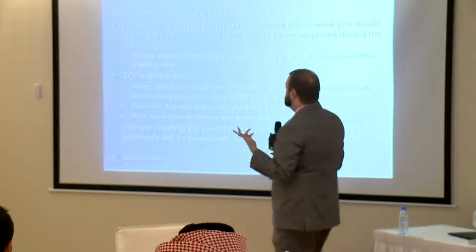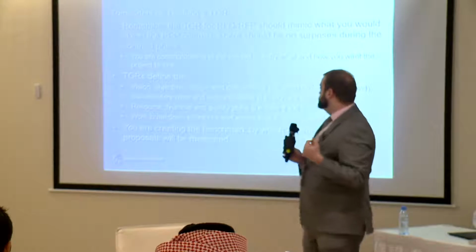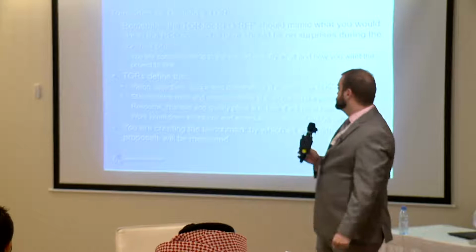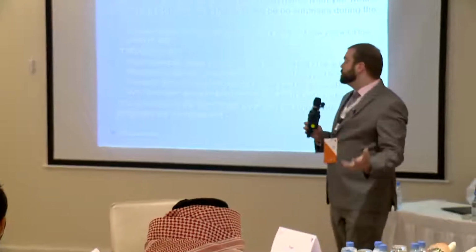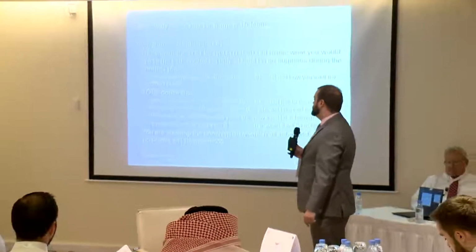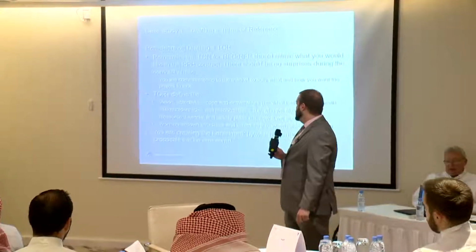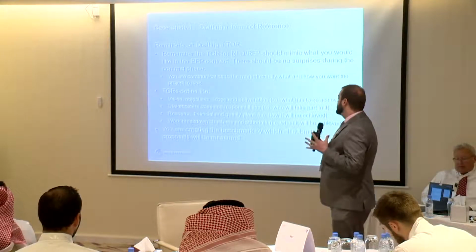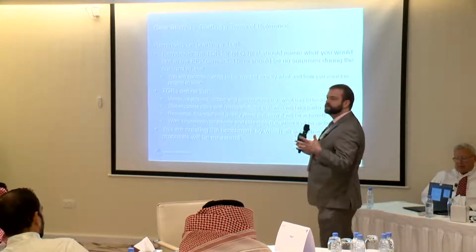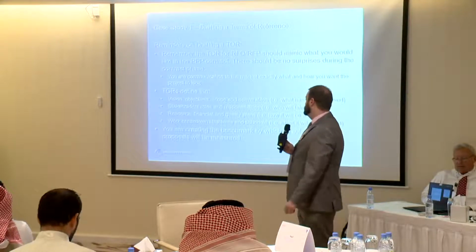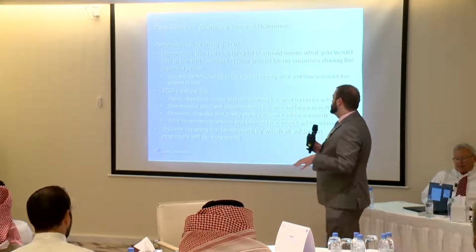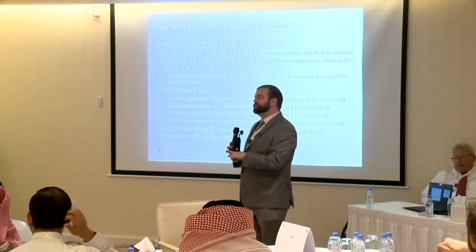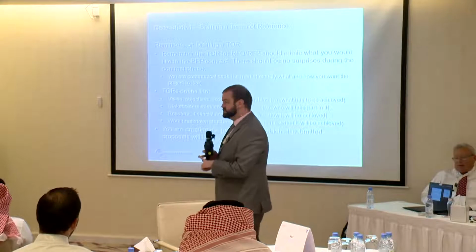Terms of reference define the vision, objectives, scope, and deliverables, or what has to be achieved. They cover stakeholders' roles and responsibilities, who should take part, resource, financial, and quality plans, and how it will be achieved, and the work breakdown structures and schedules. When should it be delivered? When should things be achieved? You're creating the benchmark by which all of the proposals submitted during the RFQ and RFP stages will be measured.